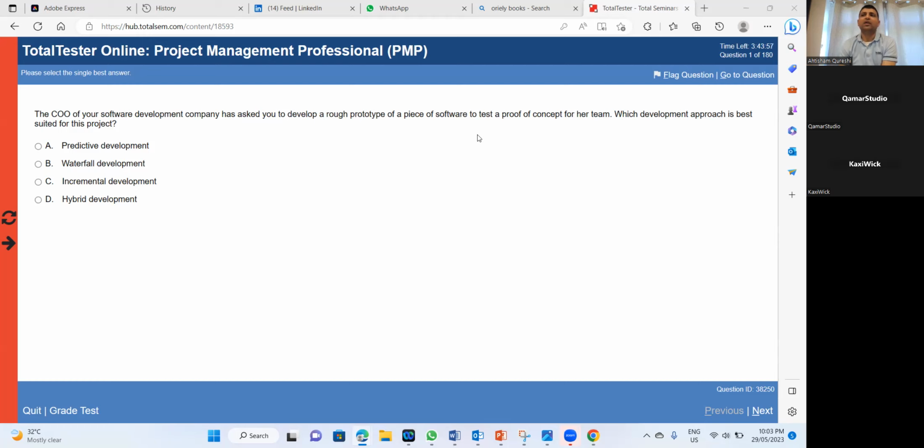So we are incremental, and we are iteratively improving those features in every iteration. Like in the first iteration, if we developed A, B, and C, in the second iteration we will develop these 3 further, like A1, B1, C1. And the third iteration will be developing A1.1, A1.2, A1.3, like that.